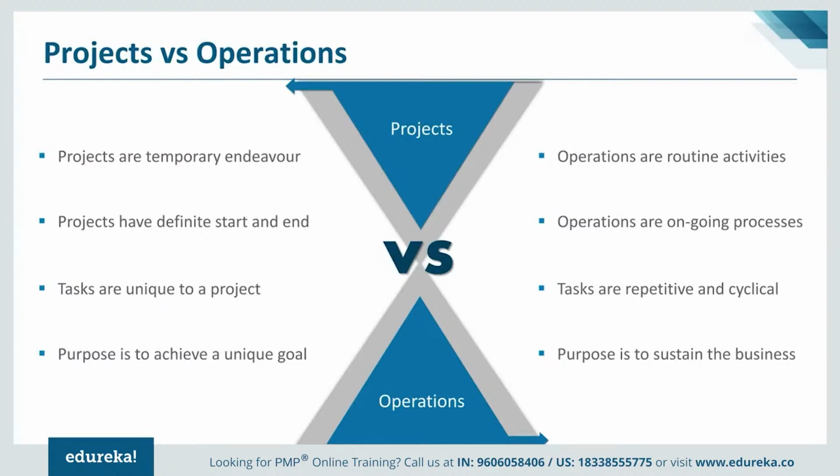However, project activities will stop once you accomplish a project to launch that IT product. So then the project is ended. What will start is the operation activities. So the key here is to make sure that there is a proper handover between the project activities and the operation activities. And therefore, you will find that the operations team work very, very closely towards the end of the project.